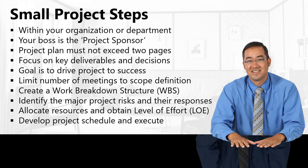Next, identify the major project risks and the corresponding responses. It's important to communicate potential risks to your project sponsor and document those responses. Once you're ready to execute, allocate resources — identify key skilled team members from the development team, QA department, or BA area — and obtain their level of effort, meaning what it will take for them to successfully complete the project, even if the costs are internal to the organization.